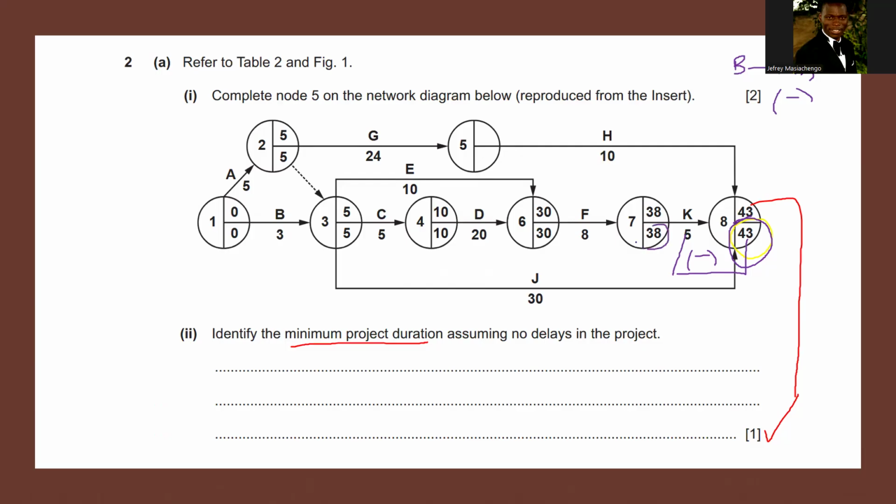So this is how they got the number below, which is our latest finishing time. Then we say 38 minus 8. What do you get? In this case, we get 30. That's how they got this 30. Is it making some sense? Then we continue. It's a backward pass. We say 30 minus what?